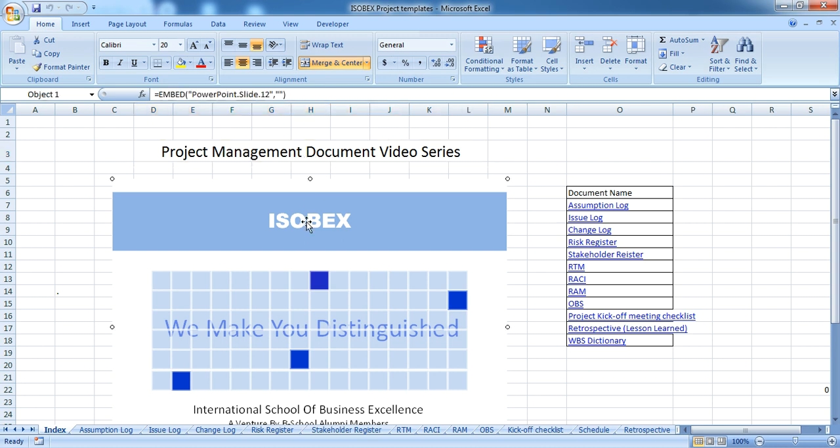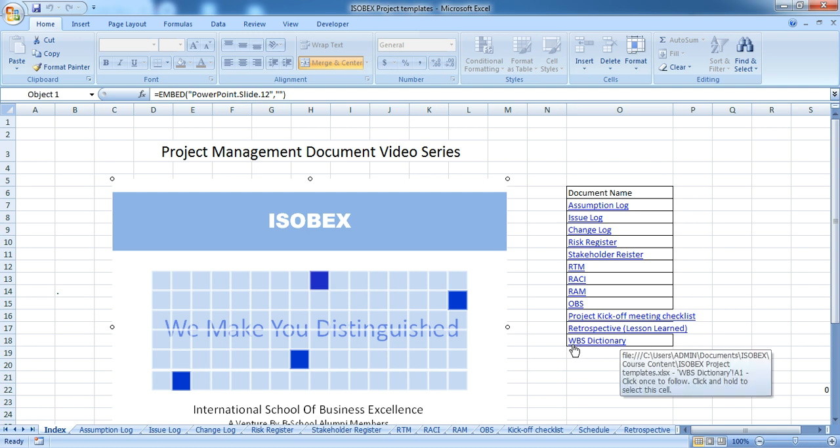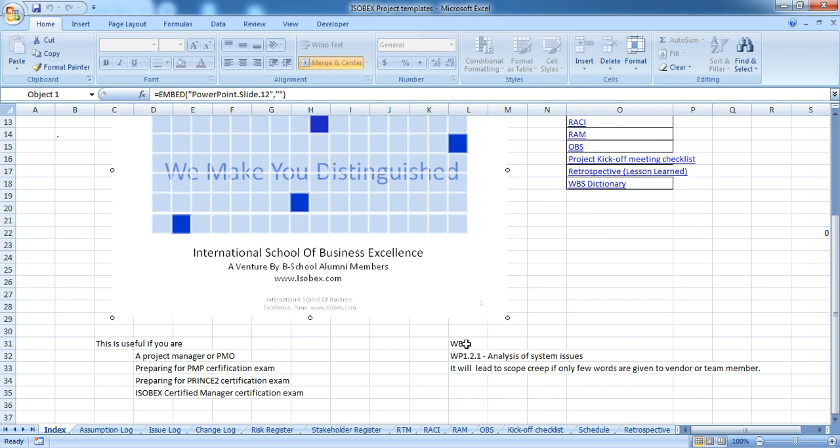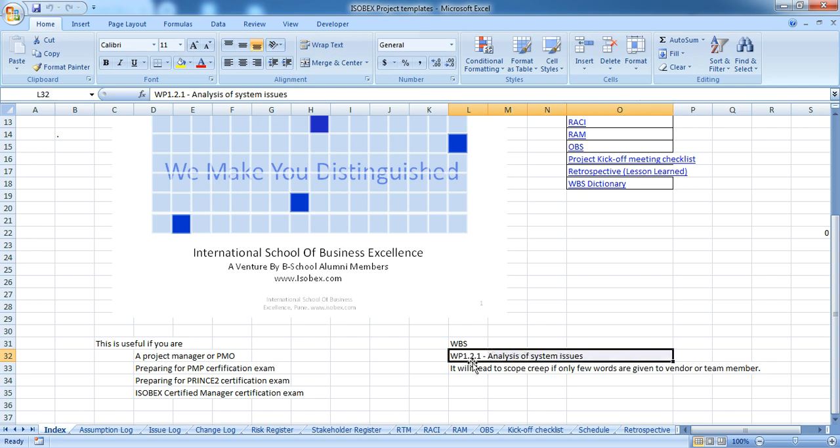In this video, we will discuss the WBS Dictionary. In my 13th video, we discussed WBS. In WBS, we identify the work package and we give some number to it like 1.1.1, 1.3.1. These numbers refer to the level of the work package in WBS, and we also write a couple of words describing functionalities to be delivered in the work package.